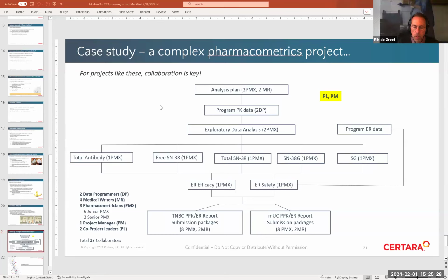Well, I don't know if that happened in this case, but oftentimes, especially with analyses that are planned to support a final submission for registration of a compound, the analysis plan may be sent to the regulators before we actually run the analysis to get their input and indeed their buy-in, for example in the data selection and in the modeling approach. So yes, that's in a way a bit of a safety net to prevent them coming with all those questions once you submit the results.